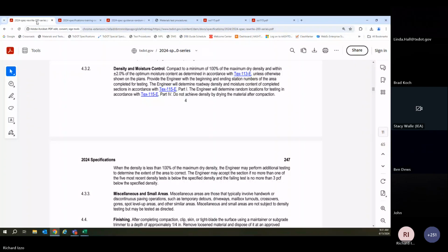Isn't the random number just a minimum? Because if you go to the testing and sampling checklist, doesn't it give you a number of tests that you're supposed to record? Yeah, exactly. So the frequency, 1 every 3,000 cubic yards, nothing of that changes. What's in Site Manager doesn't change in terms of frequency. You're exactly right. You have item 5, minimum sampling and testing. None of that changes.